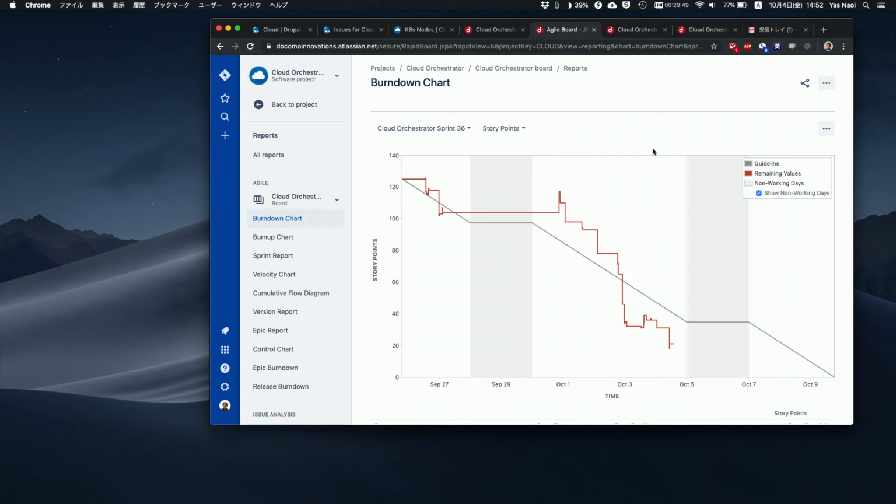That we found. Initially, this task is very big. It's something like a t-shirt size. And then we think this task is, we are unknown technology, so we cannot handle that. We put the 21. So in that case, we need to break it up into smaller tasks, or we need to think about the task itself. Basically, a 2 or 3 story points task is very easy to be done.